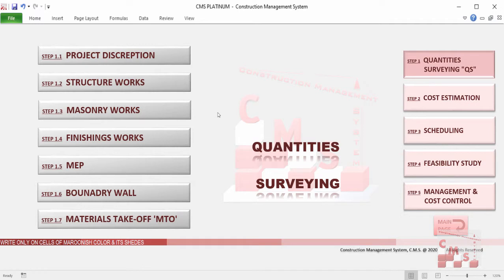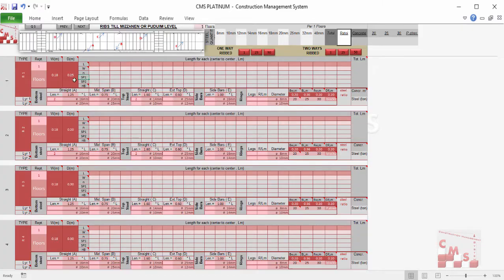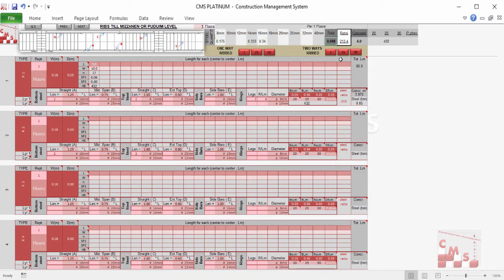Another example: for a ribbed slab, we simply enter the length and width of the slab and the reinforcement. CMS will provide directly the number of ribs and solid parts required, the number of hardy blocks required for this kind of slab, all the detailed rebar quantities, the concrete quantity, and the number of required blocks — all coming automatically.